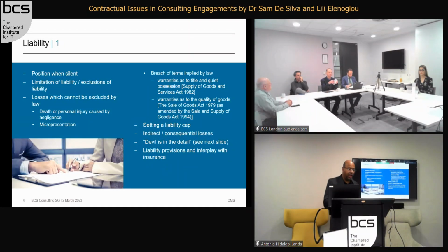So liability. What is the position? I'm going to ask anyone, people in the audience, in the room or online, what is the position if liability is not mentioned? Anyone want to answer? Oh, then it's unlimited. Yes. You have unlimited liability. So just because you haven't mentioned liability, you have unlimited liability. So you obviously want to avoid that, and that's why you put in a limitation of liability clause and an exclusion of liability clause.